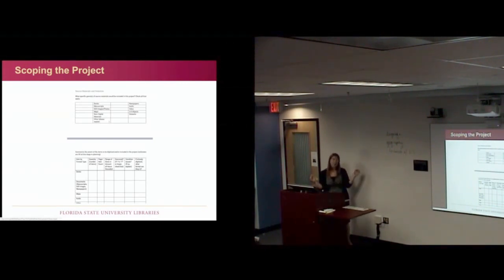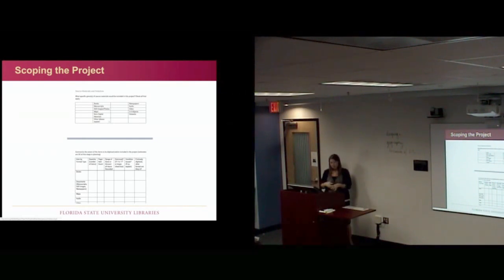and then we sit down with them and all of our staff in the DLC, and we try and hash out some agreement. So what does this project look like to both that stakeholder and to the DLC and our workflows and priorities at this time? Who's going to be responsible for what parts of the project? The DLC might do the digitization of the physical materials, but maybe we want the stakeholder to be who's creating the metadata while we do that work. And then finally, what is the expected final result? It never ceases to amaze me how I can read a proposal and come up with a very, very different final result than what the person thought they were telling me they were aiming for. So make sure that everyone actually understands what you're going to build at the end of the project.